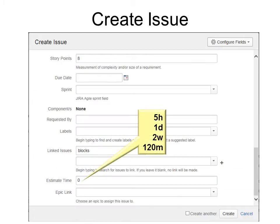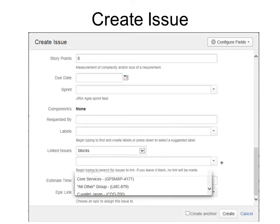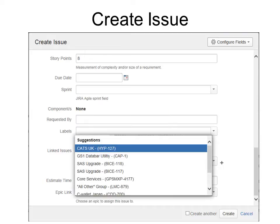Estimate your time in hours. If you put it in hours, make sure, let's say it's 5 hours, you put 5H. Or it could be 1D for day or 2W for two weeks. Now this is where you're going to actually link it to the epic. So choose the epic here and it will actually be linked to it. Remember the other ones for filtering only.